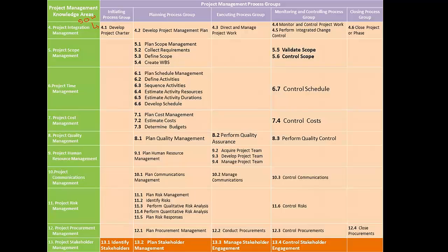If we apply the same concept for the initiation of the project, from performing organization's point of view, we can say that an agreement or a contract is created by the sponsor or the customer prior to initiation of the project, and the SOW comes as an integrated part of the contract. Based on these procurement documents, we initiate the project.